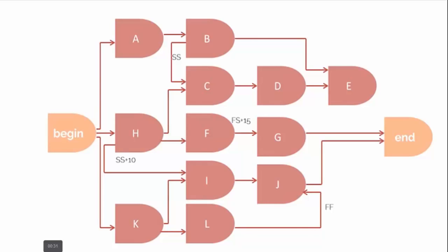In the context of project planning, a network diagram is a sequence of steps or activities commonly represented by boxes. They are linked together in the logical sequence they need to be carried out. Once the diagram has been completed, you have a clear picture of the required sequence of events and activities for your project. For example, you cannot start building your house foundation until you have first prepared and leveled the ground.